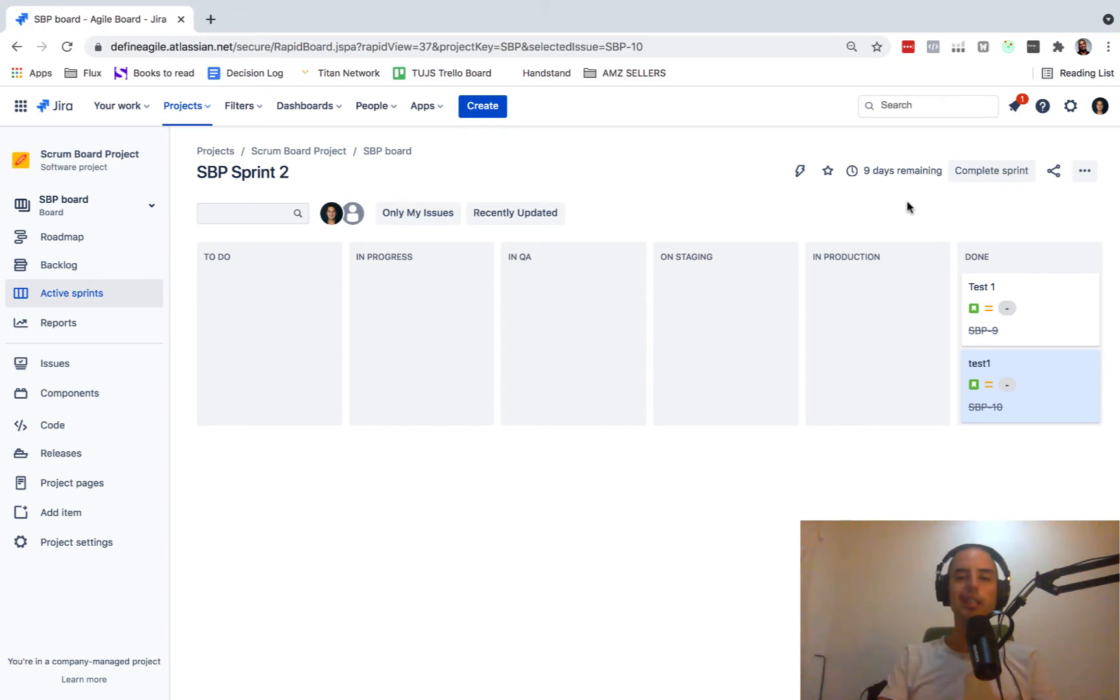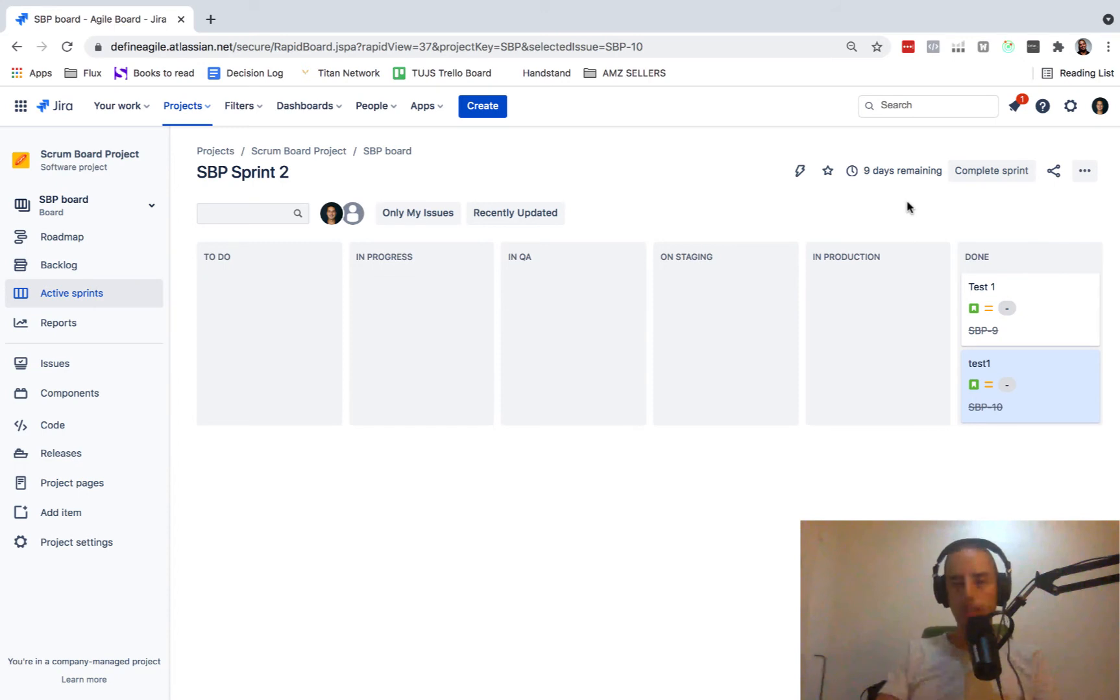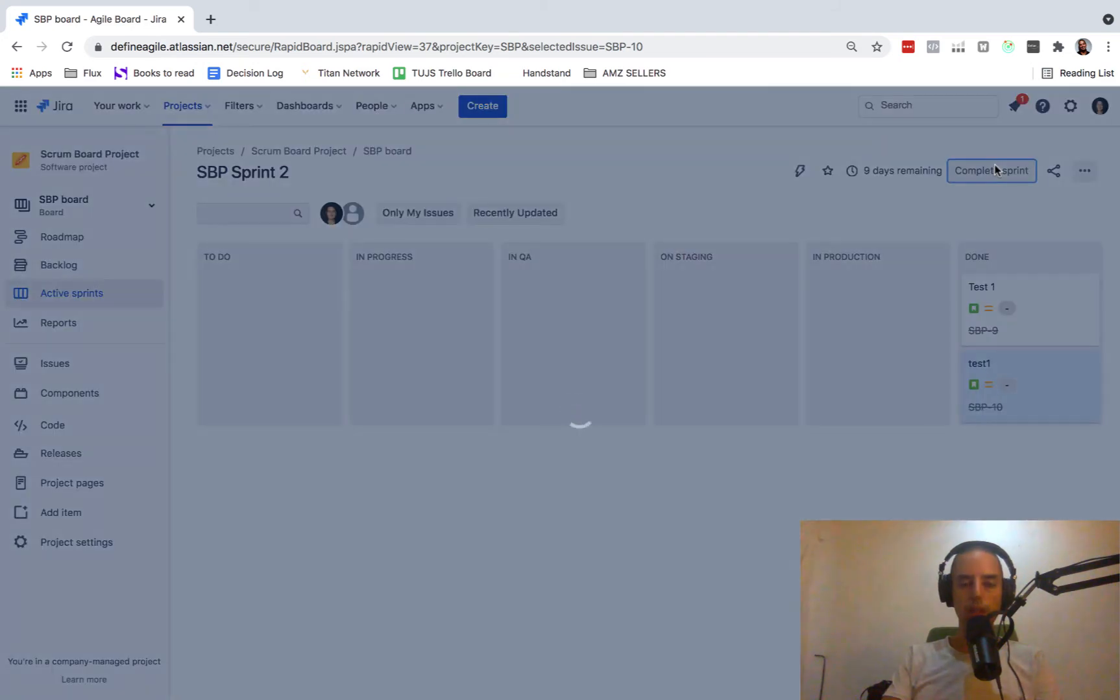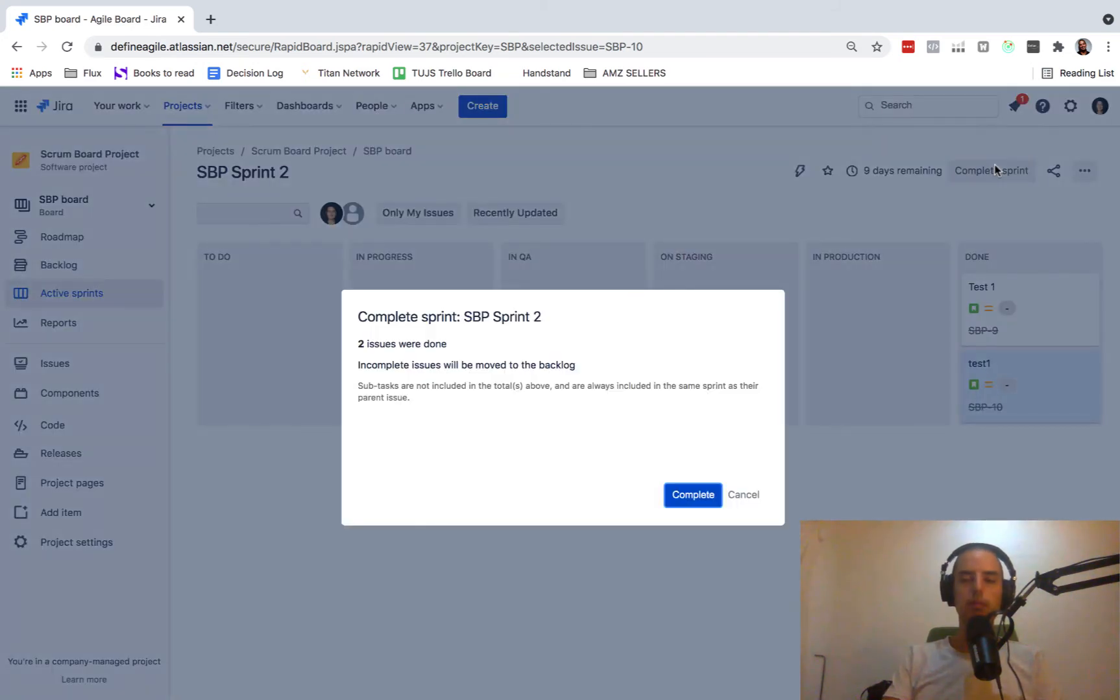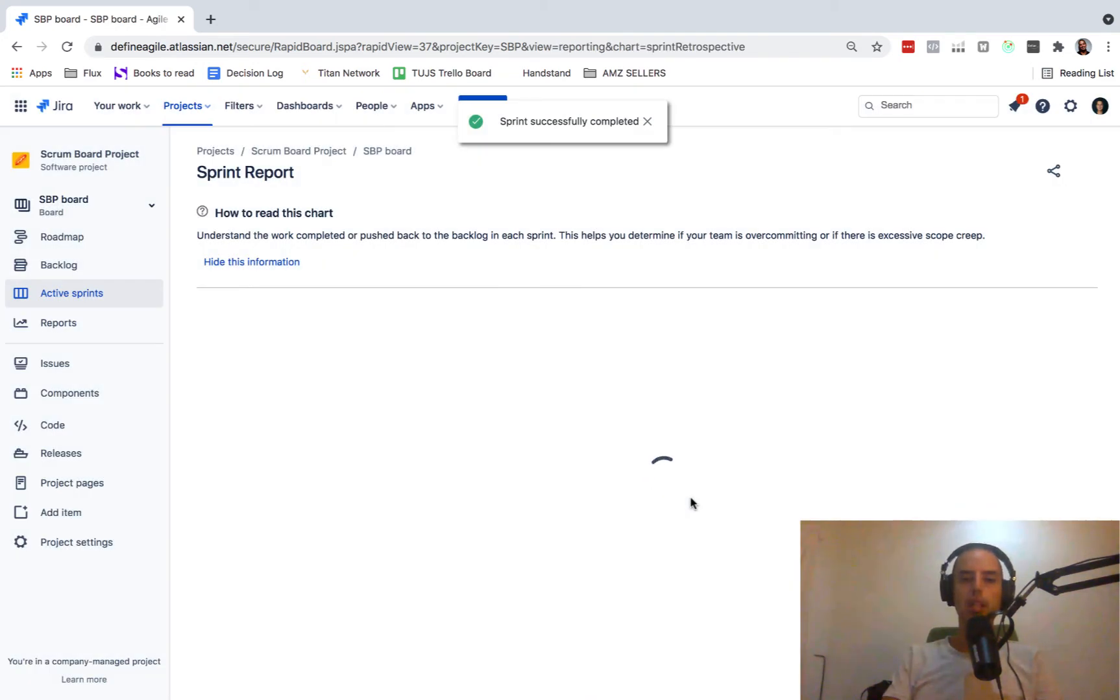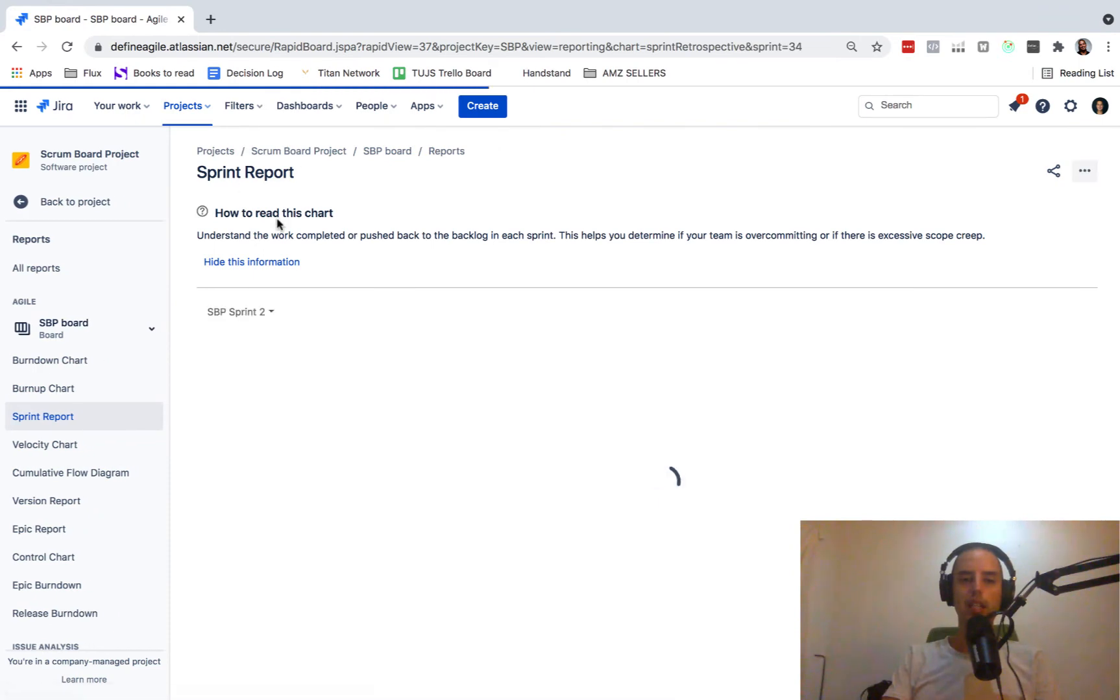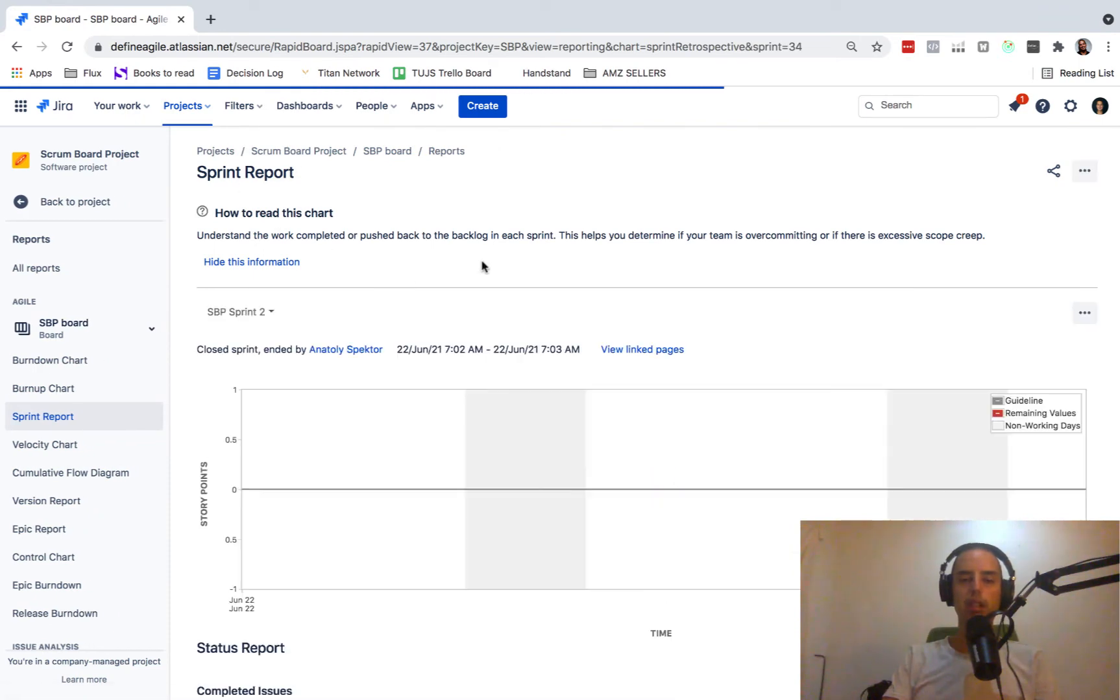To see a sprint report, you need to complete the sprint. A lot of people ask, I want to see a sprint report, but a sprint report will only come at the end of the sprint. As soon as I click complete sprint and I click complete, I will get to the sprint report.